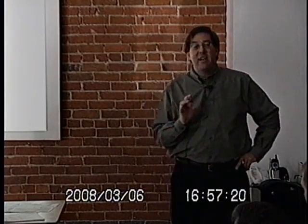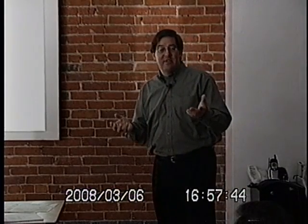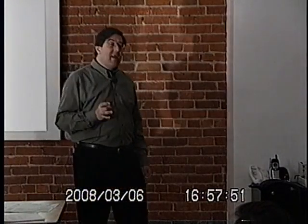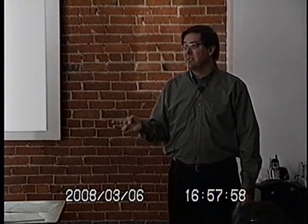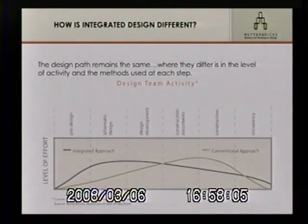And here's an example for that. If I'm a mechanical engineer and if I'm working for a university that requires that I size my ductwork as part of my deliverable, then I've drawn all this beautiful two-line work on my drawing. And if at that point I change my mind about what the criteria are for the ductwork, I redraw the whole thing. I'm back to scratch zero and start over. Or maybe I redraw 2/3 of it. If instead I've made a very solid decision up here about how much air I'm moving and why I'm moving it and what my cooling driver is, I'm very less likely to have to draw my ductwork twice. And that's where the argument comes in that the design team will save some effort later on if they've made sound decisions early on and spent their time together.